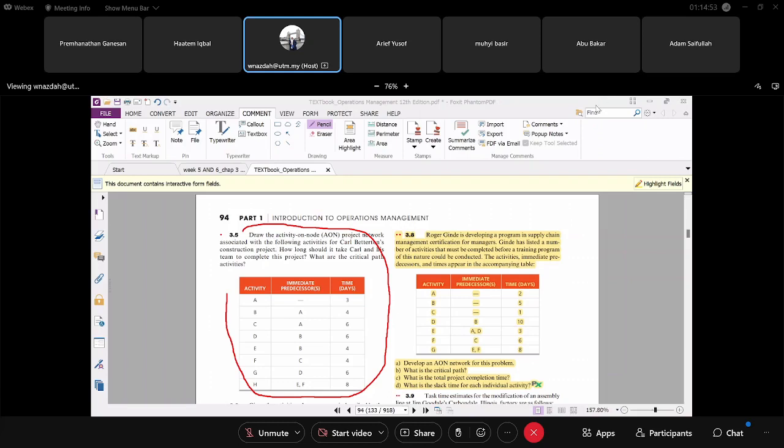Alright, so your network diagram must always have one start node and one end node. Apa yang kita nak tengok, we don't use both techniques. We only use activity on node only. Considering what you have done, saya akan remind saya to get the answer for this question. Can you remind me to share the answer for this question?